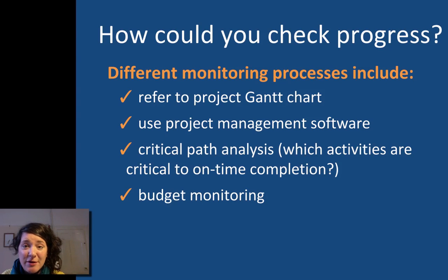You will want to be looking at budget monitoring as well. So the initial budget that was laid out in a proposal or in a plan will begin as your working budget, but then as you go through, things will shift and change. Some payments will be for different amounts. You might find out that there are things that you hadn't initially budgeted for. So all of that, you'll be keeping a track and a tally of those accounts as you go.